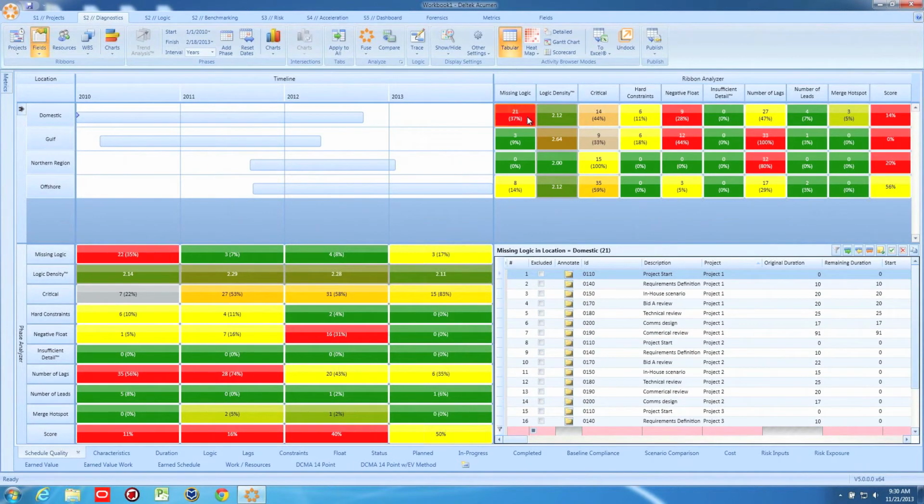And if we really want to go to the highest degree here, we can look at my schedule quality score by location. And I can see right away the Gulf region scheduled tasks have an overall level of quality of 0. In fact, they've lagged each and every one of their activities across the portfolio. I have a tolerance. Different organizations look at lag differently.